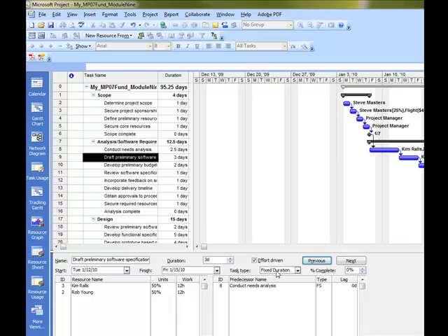But this time we fixed the duration. We clicked OK, and then we did our initial, then our secondary, and the duration stayed constant, right? That was the variable that we had fixed, and we wanted it. So as we add more resources, duration is going to stay at 3 days, and our units are going to continue to go down as we add more resources.